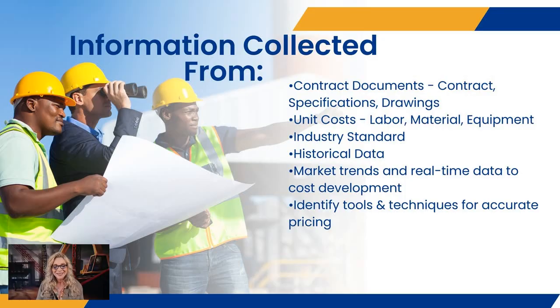This is why it's so important for superintendents not to crumple up receipts and stick them in the door of the cab of the truck. It is important to be able to code those specific to the job that you're working on so that that data can be collected and analyzed at a later date, so that when you have similar projects in the future, you can know how much plywood was used.